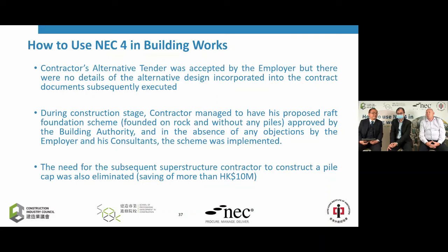And in doing that, if you stick to the pile design, after you do the pile you still have to have a pile cap. But by replacing the pile with a mass reinforced rock footing, the employer even managed to omit the pile cap. So it also helped the employer save the pile cap, which is an amount of more than 10 million Hong Kong dollars. So also a big saving to the employer. But still, a dispute arises.